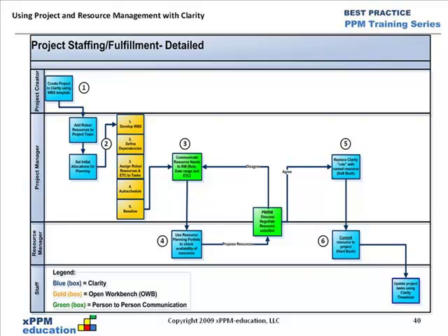And then we get to a point where we're ready to auto-schedule, which we did, item 4, in that gold box stack. And once we're satisfied with the schedule, because you could do that auto-scheduling several times, as we talked about in Module 5, then once that's set and it's good information the way it should be, then we're ready to baseline. And that is the step that we need to do next, as soon as we finish walking through this diagram.